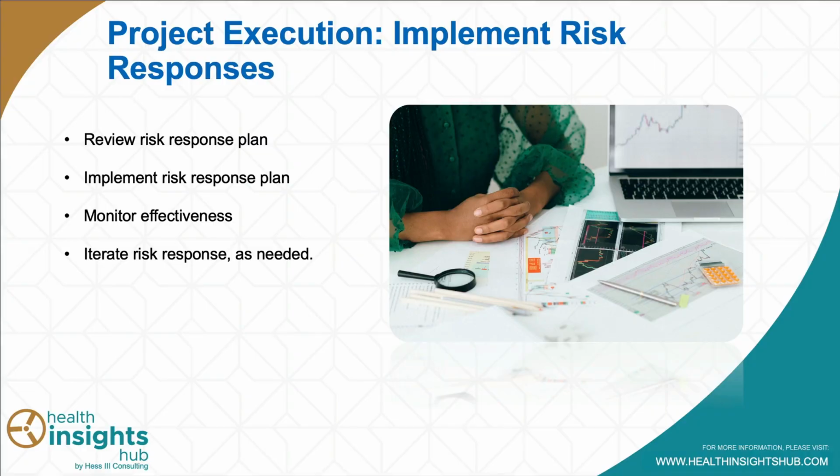And so as those risks are coming up, this is when you go to that risk management plan and say, how did we say we were going to respond to this? So you review that risk response plan, you implement the risk response plan, but very importantly and critically, you want to monitor it and make sure that that plan is working. In the next phase of project management, we're going to talk about monitoring and controlling, but these things are such in lockstep. You could not or should not implement a risk response and then just set it and forget it.